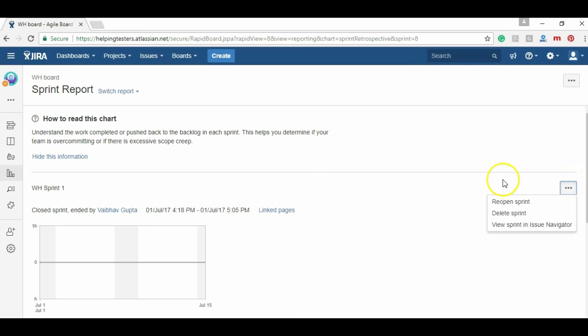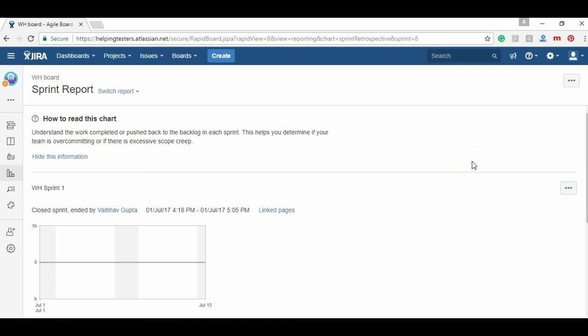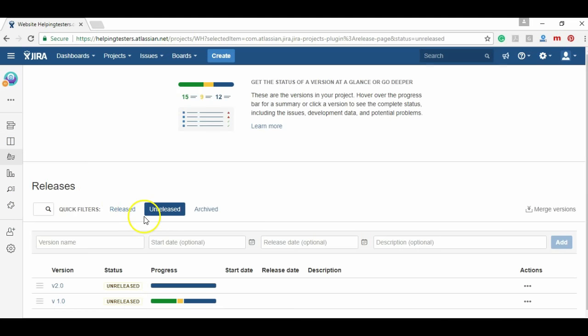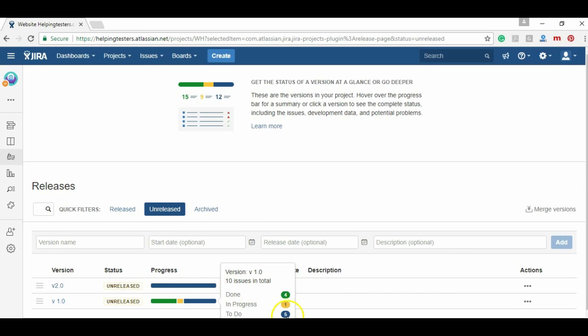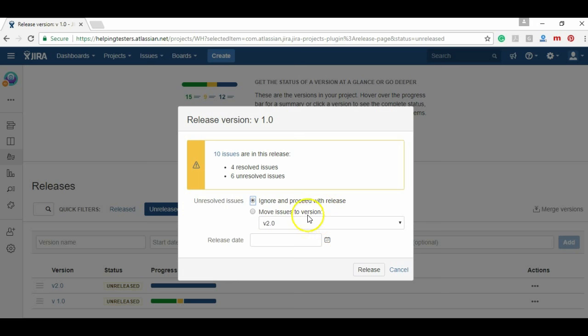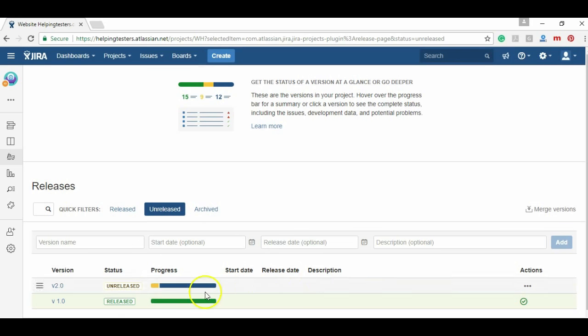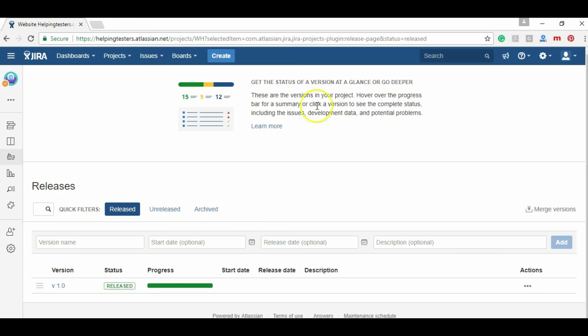Anyhow, we have a section after this. I will add a section in which we can check how the reports and charts are generated, so you have an idea how it goes. Let's see - we can delete this sprint, we can reopen this sprint if we are extending the time of sprint or some other task needs to be done. But hardly these options are done to be touched. They are never been touched, so just forget about them. That's all - how we can close this sprint, we can check the reports. If we go to releases, you can check that version 2 - in version 2 there were 2 issues in to-do state. And in version 1, 4 are done, 1 in progress, and 5 in to-do. Let's say I want to release this version in that state only. So I will make a release of this version and move issues - the issues which are not fixed, make it into release 2. Version 1 is completed and it has been released to the client. In the release, I will see the version 1.